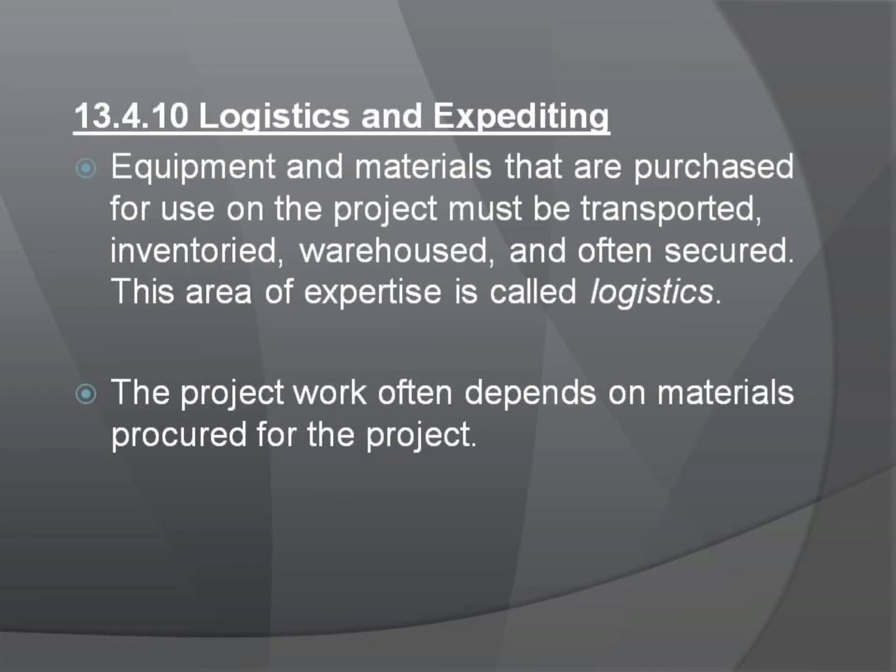Logistics expediting. The logistics for the project can be managed by the project team or can be included in the RFP or RFQ. On international projects, materials may be imported and the procurement team manages the customs process. On smaller projects, the logistical function is often provided by the parent company. On larger projects, these activities are typically contracted to companies that specialize in logistical services. On larger, more complex projects, the procurement team will include logistical expertise.